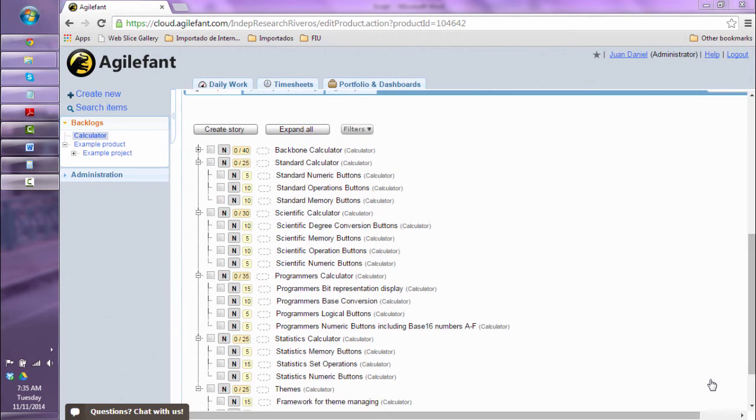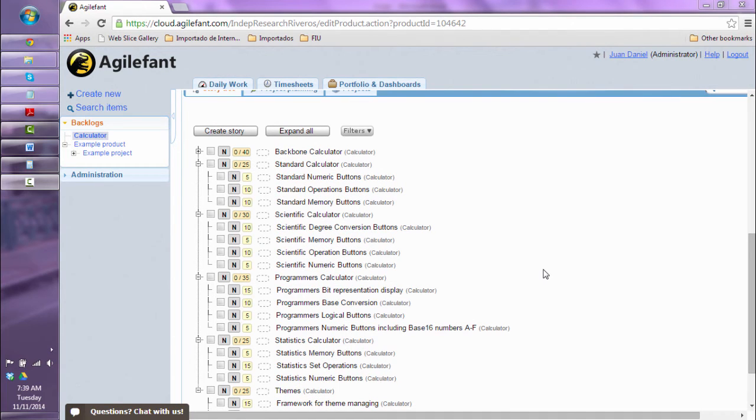Now you have your entire story tree. Of course, normally you won't know in advance everything that you'll ever want to have on your product, or you may just have an idea of some features you want to have. For this, you can simply create an epic story without any further detail, and later in the future, once you know the details, you can include them in your product. Remember that Agile is all about iterative development.